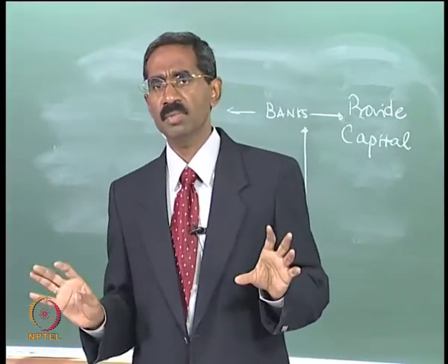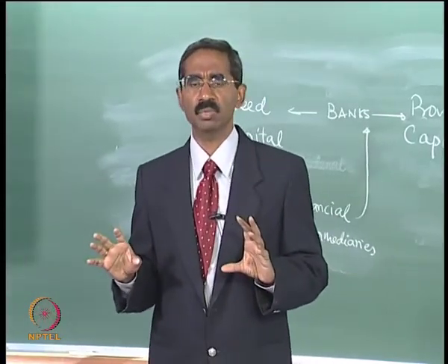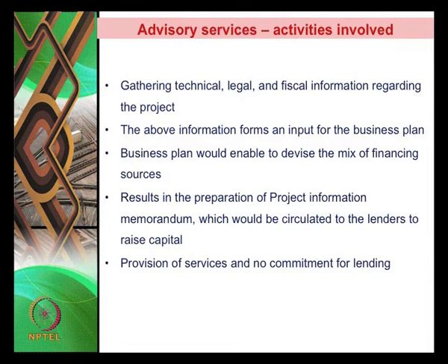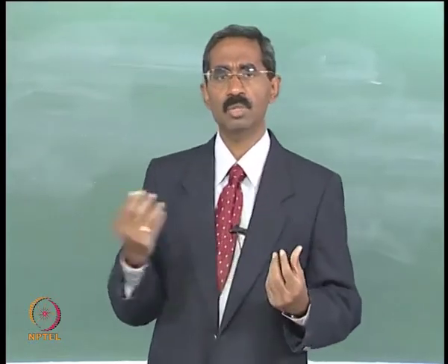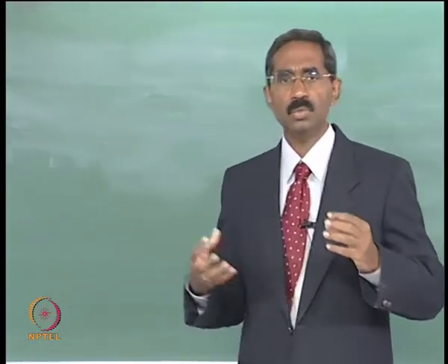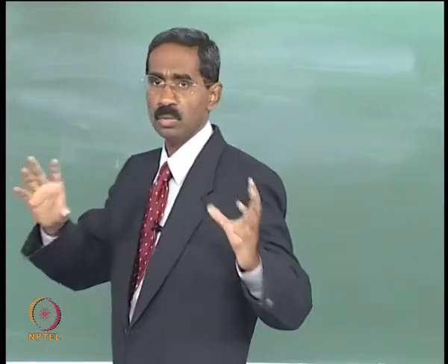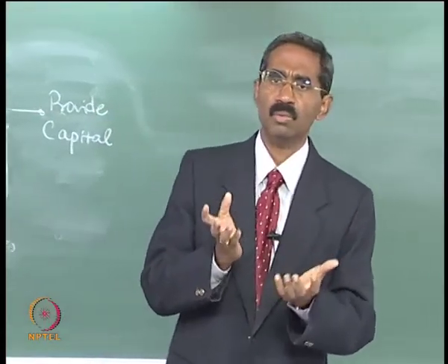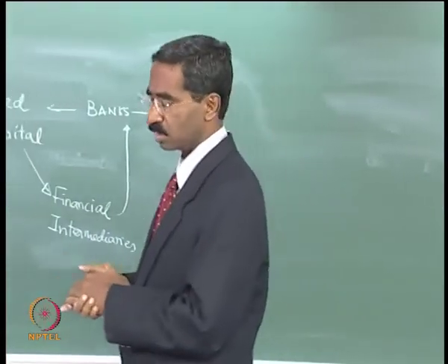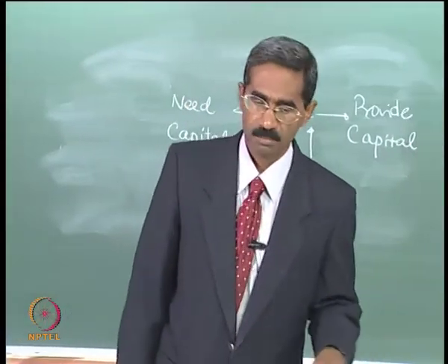Now after developing the business plan, what next? Okay. So after developing the business plan, the next would be to find out how we actually finance this business plan, okay, and what will be the sources of capital, how much will be the debt, how much will be the equity, and who are going to be the sources of debt, how are we going to source equity. Okay. So that is going to be the next step in terms of what will be the sources of capital that we will approach for funding this business plan.